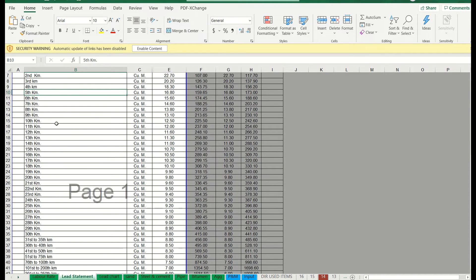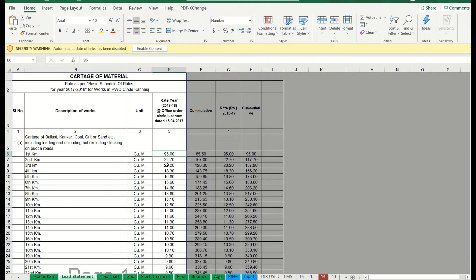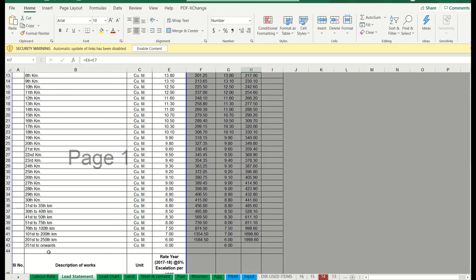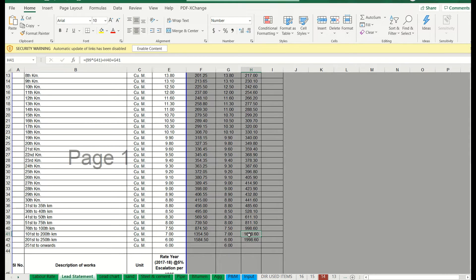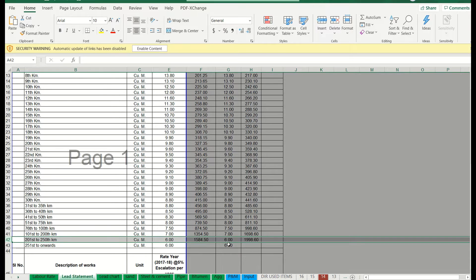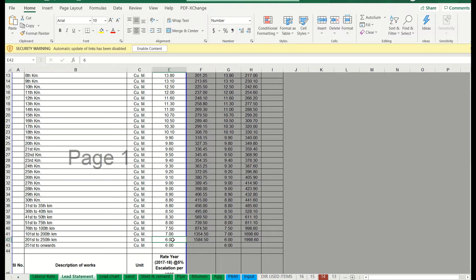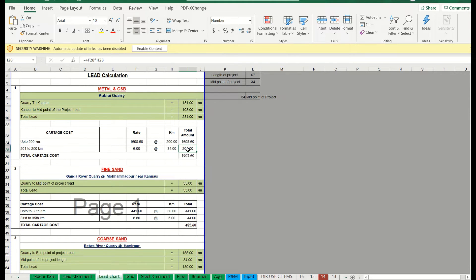Now we need to calculate the lead cost. Go to the lead statement: for the first kilometer it is 95 rupees, second kilometer 22.7 — add them cumulatively: 95 plus 22.7 is around 117. Our lead is 234 km. For up to 200 kilometers the cumulative cost is 1698 rupees. The remaining 34 kilometers fall in the 201-250 range at 6 rupees per kilometer: 34 into 6 is 204 rupees. Total lead cost is 1902 rupees.